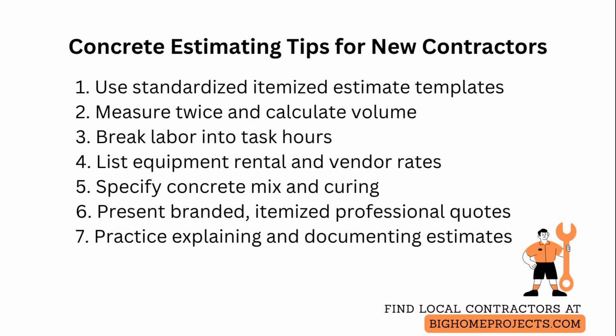Include specifics about concrete strength, admixtures, slump, and curing methods so clients know the performance they will get and you can justify cost differences between options. For equipment and subcontracted work, list rental days and vendor rates rather than lump sums so the client sees transparency and you can adjust quickly when prices change.